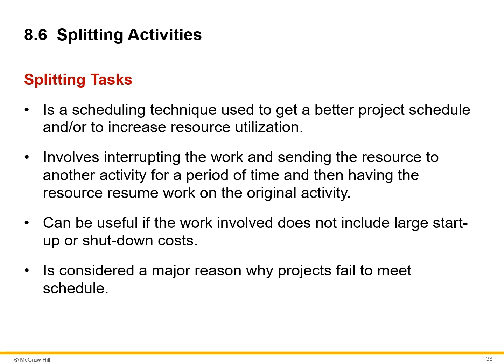The most common error is to interrupt people's work where there are high conceptual startup and shutdown costs. For example, having a bridge designer take time off to work on the design problem of another project will cause this individual to lose a full day shifting conceptual gears in and out of 2 activities. The cost may be hidden, but it is real.